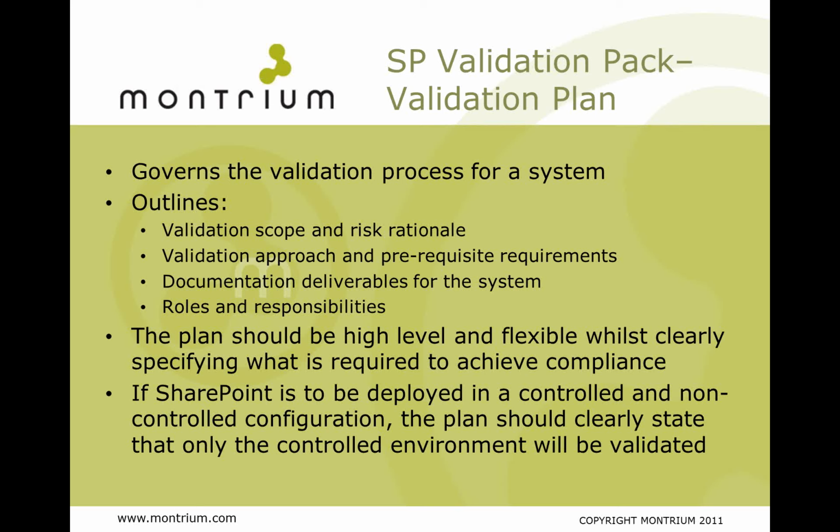The validation plan will also outline all of the documentation deliverables for the validation effort, as well as potentially prerequisite documents that need to be in place. And then finally, it'll outline all of the roles and responsibilities of everyone who's going to be involved in the validation effort. The plan should be high level and flexible, so you shouldn't be writing a very, very detailed document because, of course, you also have your CSV SOP, your Computer Systems Validation SOP, which provides all of the procedures that you follow for validation. It should, however, specify what is required to achieve compliance because you're going to measure against this when you get to the end of your effort.